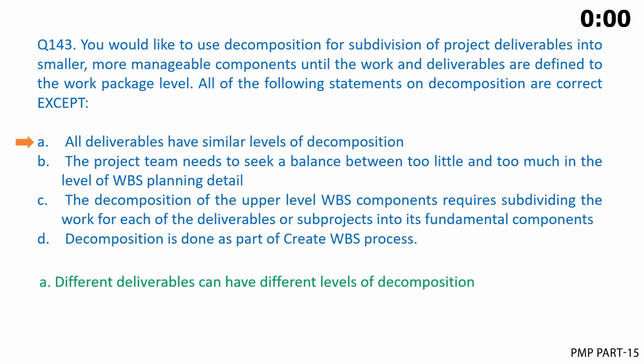The correct answer is A. Different deliverables can have different levels of decomposition.